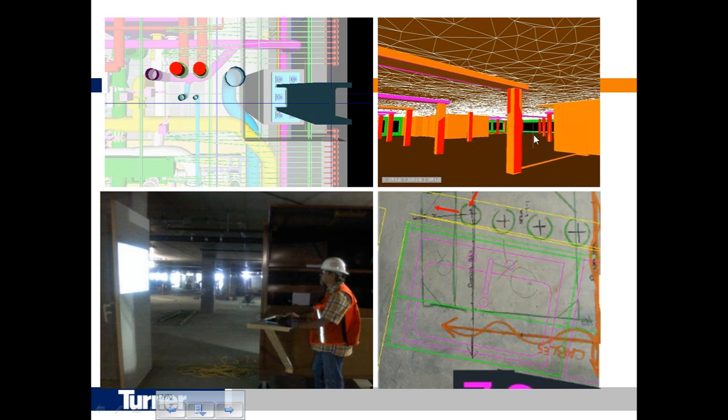There was significant cost with this, and turning this into a model. It was a recently built building. It was only about a year old, but nobody believed the as-builts in it, and so we had a laser scan and then generated it into a model. That was, for me, the point at which I said, well, if I draw my models correctly and I build to match the model, then I'm going to be saving all this money on going back and laser scanning.